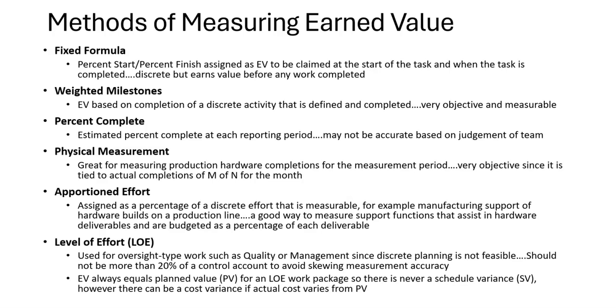And basically, you'll see in how CPI is calculated, you're getting ahead at the front, and then you're eating away at that earned value because you have actuals without any additional earned value. So you start out good and you start degrading your CPI. I don't particularly like that method.